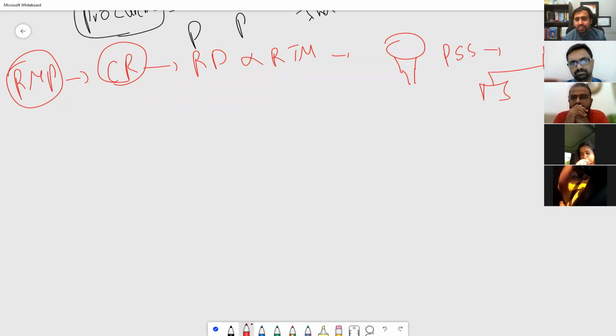In order to understand this WBS, we have the WBS dictionary, to understand what the dependencies are, how the things work. We also have code of accounts and those things to help out in these areas. Okay, once we made these things, once the project scope statement is approved, WBS is approved, WBS dictionary is approved, we get our first baseline, and that is the scope baseline.